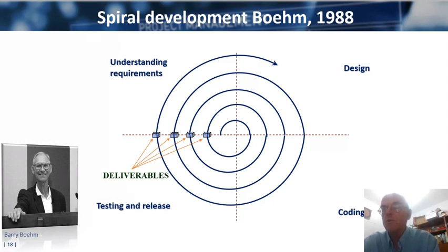The development process in a spiral model proceeds in a series of cycles or spirals. The development process is divided into multiple iterations or spirals, each producing a partial version of the software. This allows for progressive refinement. The model places strong emphasis on risk analysis and management throughout the project cycle. Risks are identified, assessed, and addressed in each spiral.